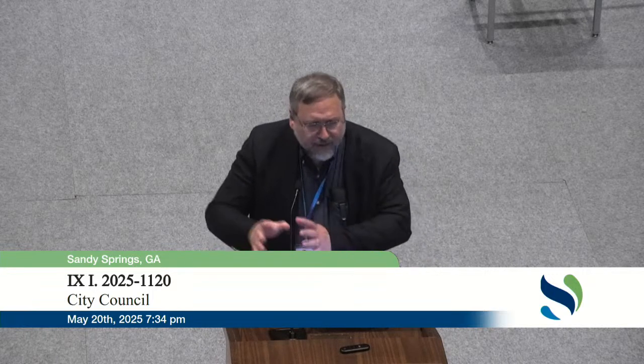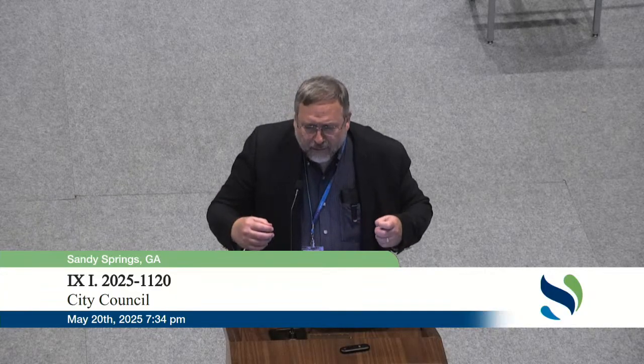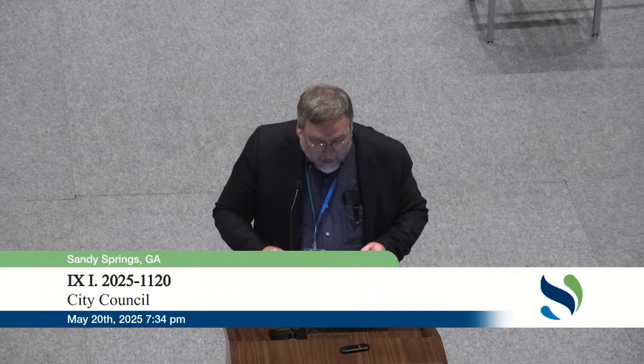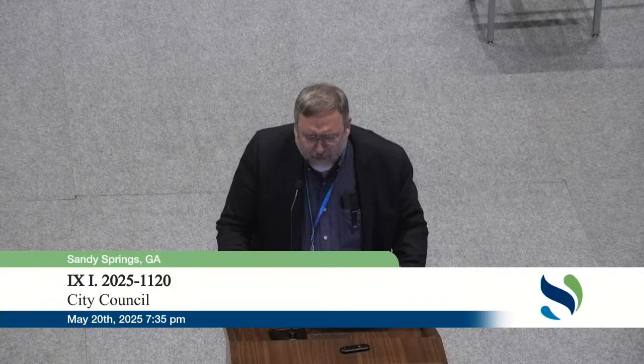And capital contingency is kind of where our public works folks, very good at budgeting the project and running it, so that we have a little extra, we just take that extra and, to keep it in the capital fund, we put it into capital contingency. It usually accumulates to a very good amount, such that even with new projects coming in a fiscal year, there's enough in there to cover the new projects that are coming in. So we don't list a capital contingency increase in our budget book.